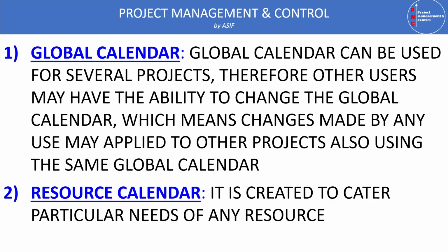But the disadvantage of using the global calendar is that many users have the right to modify this calendar. If anyone can modify anything in the calendar, any working hours or holidays, the impact will be on all other projects using the same calendar. That's why the global calendar is not recommended for use at the project level.